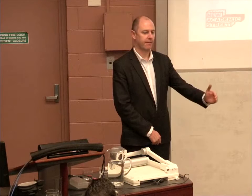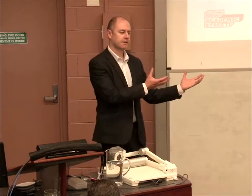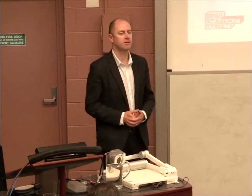Previous to the Swanson Academic Building, the university used to deliver buildings and then people would move in and then any teething problems would be sorted out. With the Swanson Academic Building, under the eye of Ian Palmer, who is a bit of a change management guru, we looked at a system of strategic user groups and technical project groups to really try and smooth out the transition of completing a building, moving in and then operating. So we've been meeting with various technical groups with the university over the last probably 3 years in preparation for this project. And it is a very complex project.